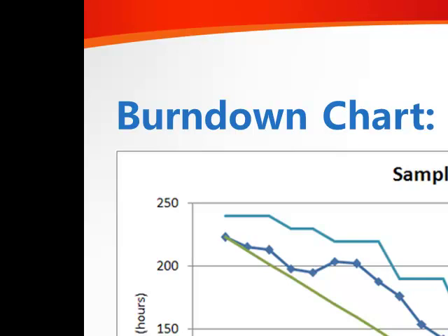This you'll visually see extremely easily in a Burndown report. If you'll take a look between day 4 and day 5, you'll see that the darker blue line has gone up above 200 hours of remaining effort. This indicates that the developer, the team, actually, this is for the entire team. Somebody on the team realized that their remaining effort needs to be increased instead of decreased.